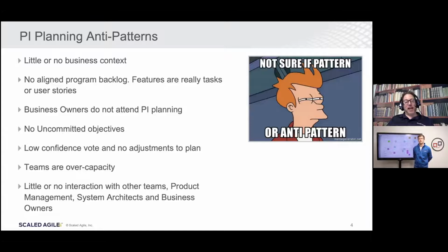And what we always find is teams are often over capacity. And as I mentioned earlier, it's mainly the teams doing it to themselves. It's not managers saying, oh, you need to do this and you need to do that. Often we take on more work than we need to plan. And often we don't realize that because we're not really looking at our load versus our capacity. I even see errors often made in people not calculating their load and capacity correctly.